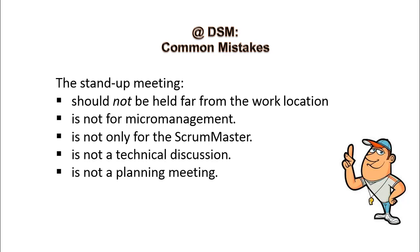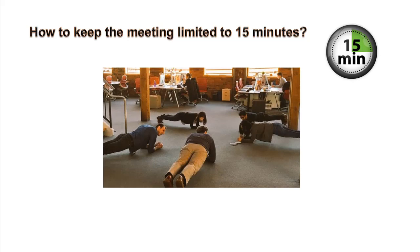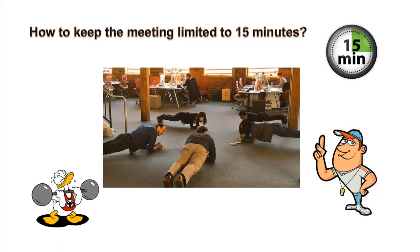When the teams don't follow this, they end up conducting long stand-up meetings, wasting productive time, and teams lose interest in attending the meeting. So the question is how to keep the meeting limited to 15 minutes. A scrum master shared that he asks each team member to drive the meeting once a month so that they get exposure. Yet another suggestion is you can let the speaker hold a token if you want to avoid several simultaneous conversations, but this one has to be at least 5 kilos. This will remind the speaker to limit his or her contribution to factual and necessary details.